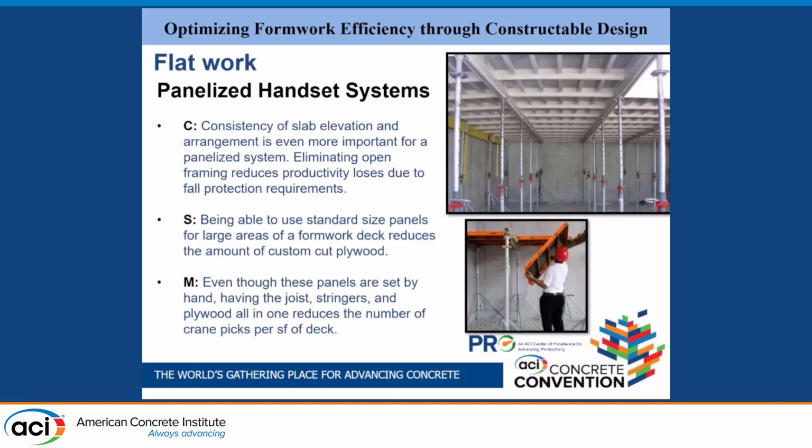Being able to use the standardized panels keeps them from having to cut plywood in. If you don't ever have to leave what you're doing, working from below, putting that in, to go cut, to measure, to cut, to put in, try to fit, nope, that doesn't fit, let me cut a little bit more, and moving around, that reduces productivity. You can just have these panels that snap right into place, set, and that all relies on having things as uniform as possible.